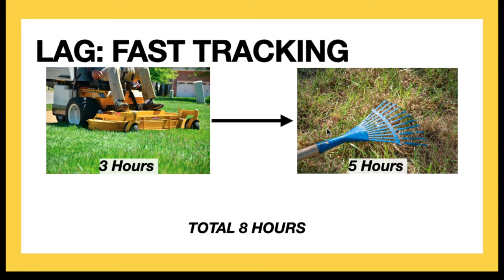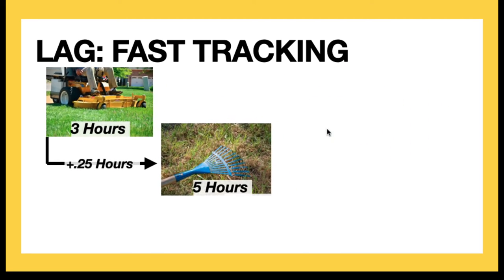Instead, what we could do is change this into a start-to-start relationship with a short lag. So in this case, I'm going to wait 15 minutes after you start mowing, and then I'm going to go ahead and start raking. So these lags are often used when we are fast tracking something and taking a relationship from a finish-to-start into a start-to-start.